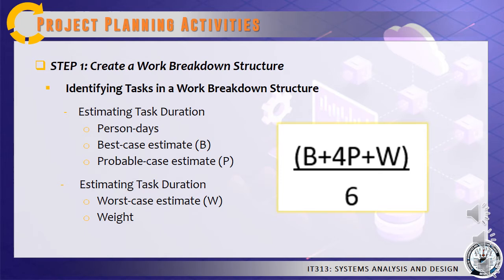For example, if it will take one person 20 days to perform a particular task, it might not be true that 2 people could complete the task in 10 days or that 10 people could perform the task in 2 days. Some tasks can be divided evenly, so it is possible to use different combinations of time and people, up to a point.